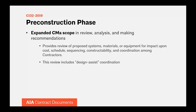In past versions of the C132 it was unclear what level of reviews the CMA did, and at times their role seemed to be just moving information between parties. We've now expanded the CMA's reviews into design and system or material selections, particularly as these choices impact cost, schedule, and construction sequencing. Our task group felt that any construction delivery might be used, allowing early presence of contractors and subcontractors on the project — and these firms could provide valuable input and suggestions during design. The CMA's role is to review and evaluate those suggestions, because what might be beneficial for one contractor may make the work more expensive or complicated for another.